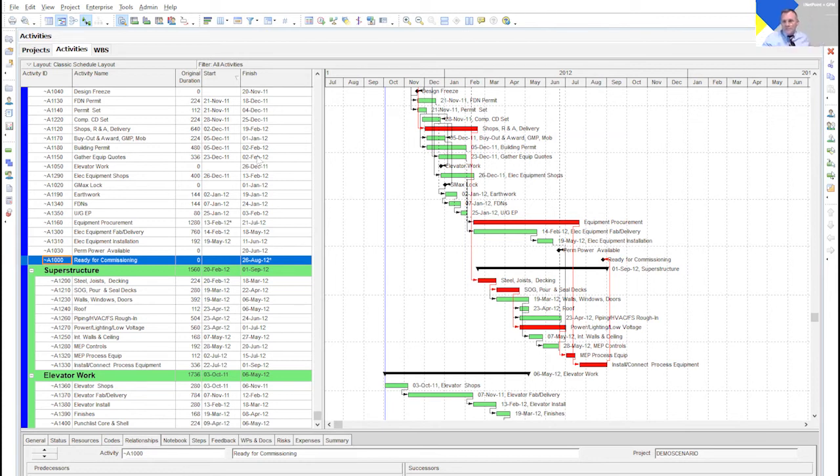Like a dummy. Yeah. Or you put in a constraint to say, I don't have an option, I constrain the activity over here. If in the future I get more resources, I will remember to remove that constraint and let this activity fall earlier. But unfortunately, that's how CPM works. If you have activities that are not supposed to start on their early dates, you will need to constrain them. And that is something which GPM does not require. It gives you the flexibility to use up available float in your schedule and move an activity to a later date if that is the preferred plan for the project. No, that's perfectly fine.